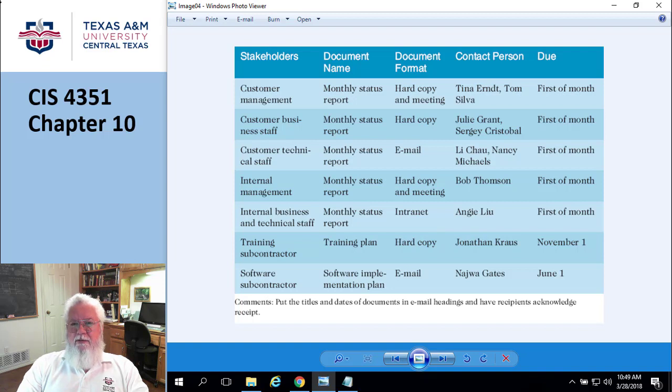So, 3 broad classifications: interactive, which is face-to-face and where I can talk back. Push means I unilaterally just push things to you unsolicited, sort of like spam, except hopefully in this case it's not spam. I just push it to you without you asking for it. And then pull is you have to say, "Mother, may I?" And yes, I'll provide you the information.